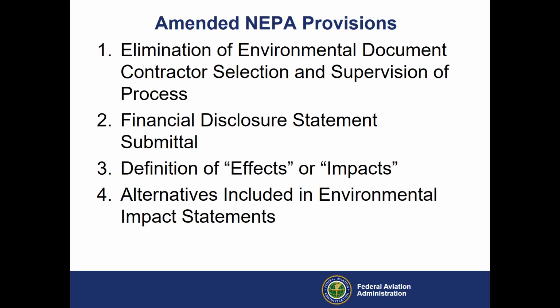While the framing of an effects analysis has changed, CEQ stresses that no particular category of effect has been eliminated. Notably, for instance, in the preamble to the amended regulations, CEQ confirms that these changes do not inherently eliminate discussion of climate change impact. Furthermore, CEQ has also focused its definition of effects further by specifying that but-for causal relationships are insufficient to make an agency responsible for a particular effect under NEPA.